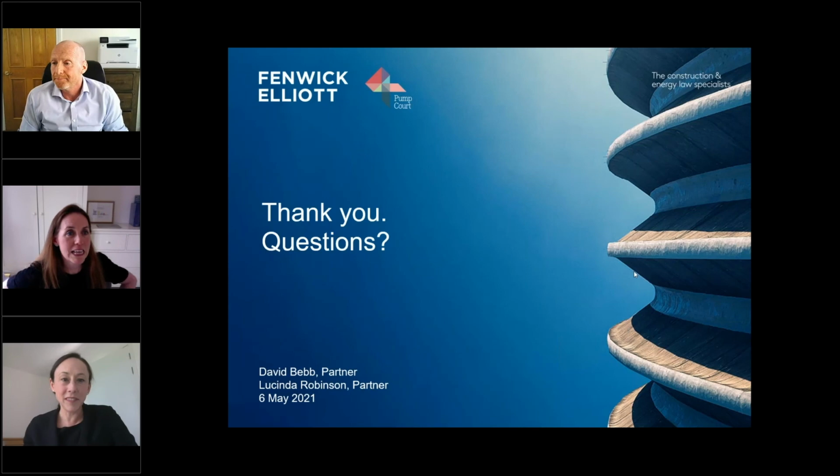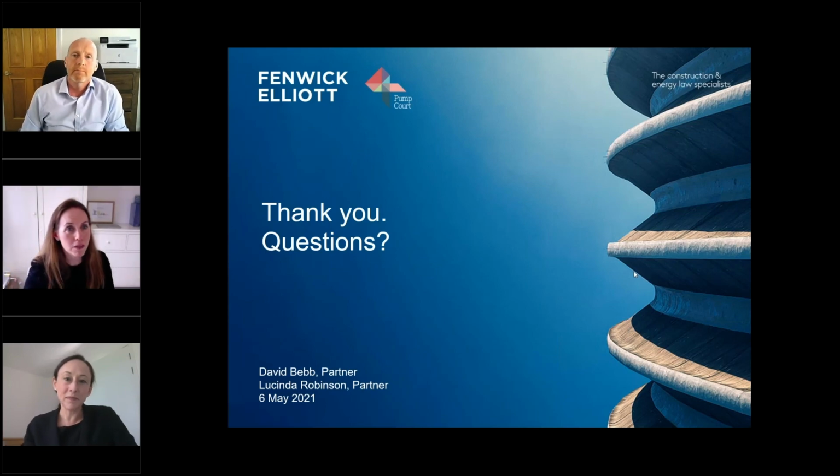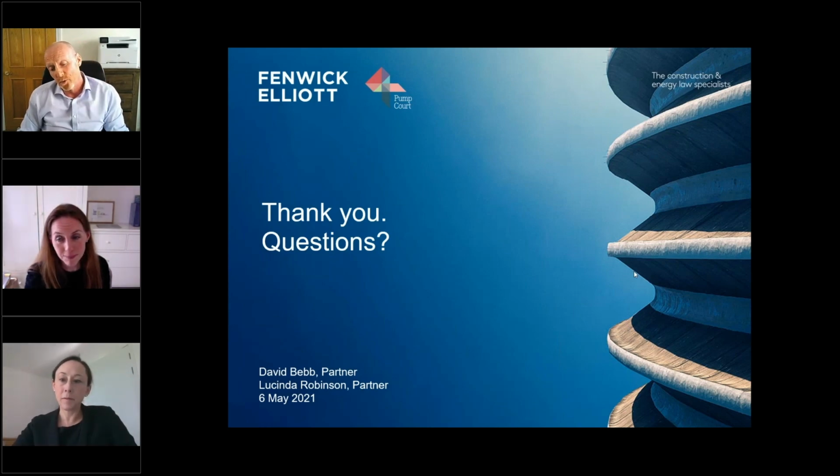Okay. And there's always that danger of doing more work than the letter of intent entitles you to be paid for, because there have been contractors that have caught a cropper doing that and only been paid a fraction of the work that they've actually done. Absolutely, yeah, totally. Although usually now, the letter of intent is a little bit clearer in saying, whatever happens, we ain't going to pay you any more than X pounds. But that still is not in enough red pen, Lucinda, for it to jump off the page, or to be actioned at least, anyway.